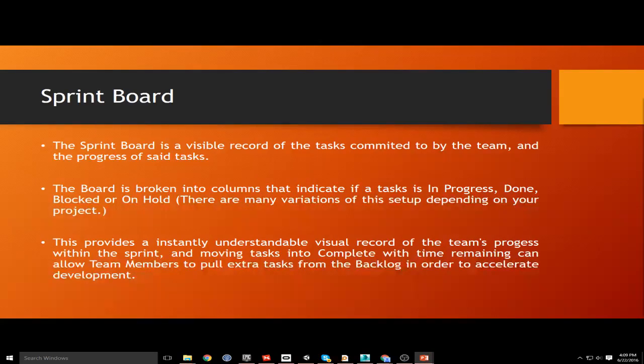So a blocked task is one where you're going, hey, I can't do this until Linda completes coding up the save game system, so I can't display the score or the name because it just doesn't exist yet. At which point Linda goes, oh yeah, okay, I've got that on my list for things to do once I've completed these tasks, so if you want to take something else on in the meantime, you can do that, or I can prioritize that. How do you want to do this thing? So it's not about them not having done this thing. It's more like, I'm up to this stage with my thing, and it is dependent on something else being completed, so we'll need to maybe rejig things a little bit and have a conversation and collaborate more closely, perhaps.